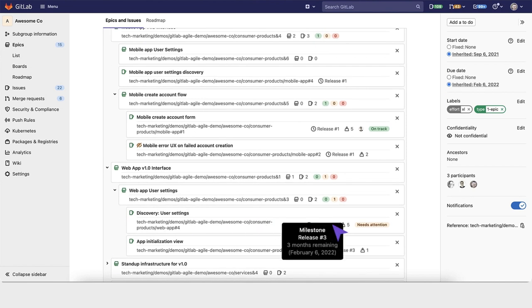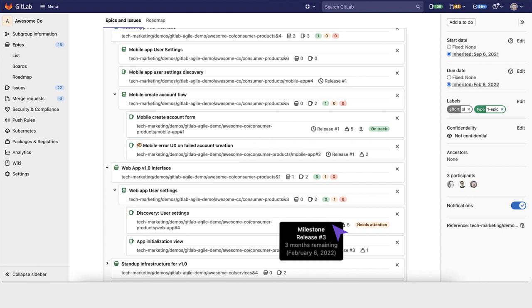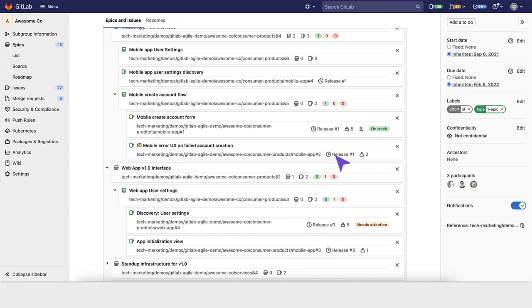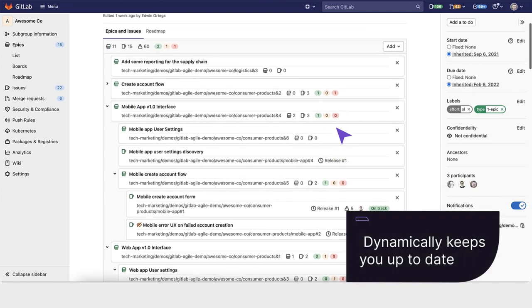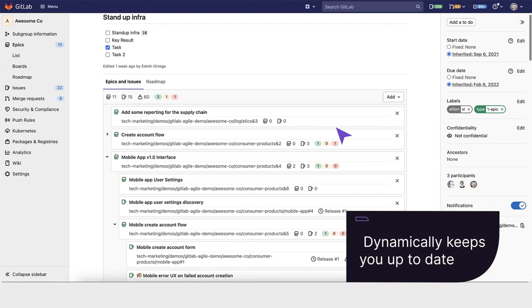It then picks an early start date based on the issues assigned due dates, iterations, and milestones, and that milestone's start date. GitLab then looks at the latest start date it can find across all those time ranges and dynamically keeps us up to date.